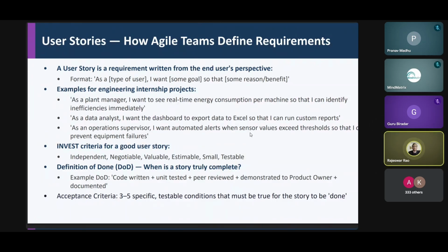So you have a project requirement document, which is at a very, very business level. But when you start talking to the customers, they'll start giving you requirements in a narrative way. And those narrations are at an atomic level, which can be further broken down into a set of use cases. I'll give an example. Suppose in your project about an employee performance dashboard, I as a user would say that I want a dashboard to see the weekly and the fortnightly performance metrics of all the students or all the employees on these parameters.